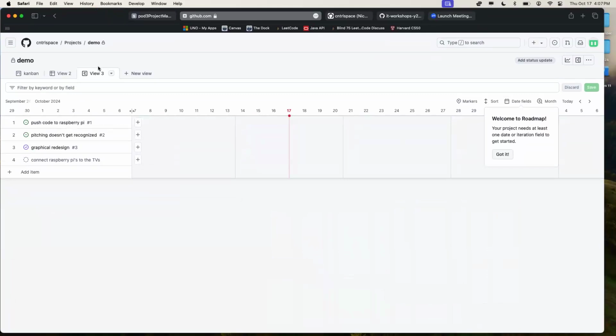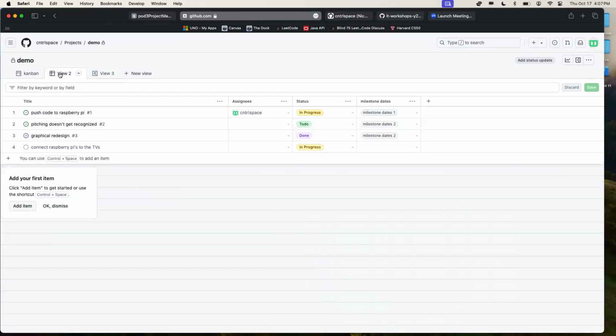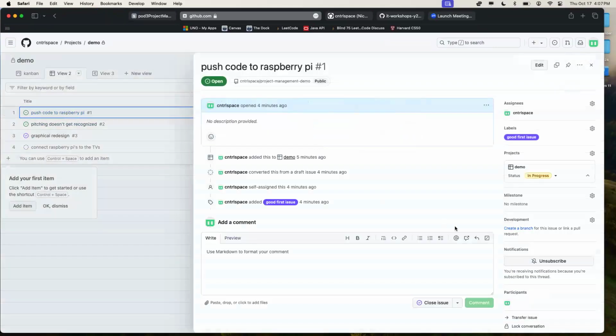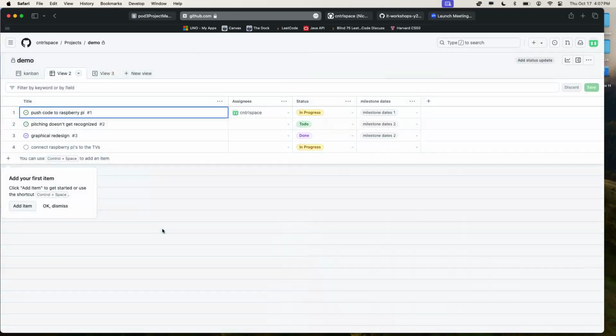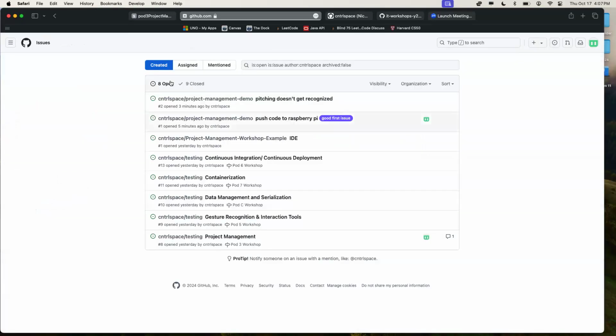No, not on Kanban, unless you click on it directly on the issue. And then you can see it in this one. This is just a table view. So regarding your question, if you wanted to see milestones on Kanban, what I've seen done when I've worked with teams is that their Jira board or whatever will have milestone 1, milestone 2, milestone 3, and then they'll have a backlog all the way behind it.